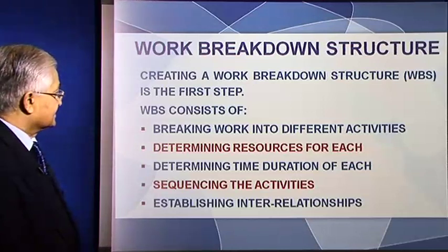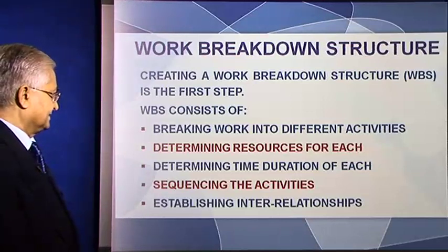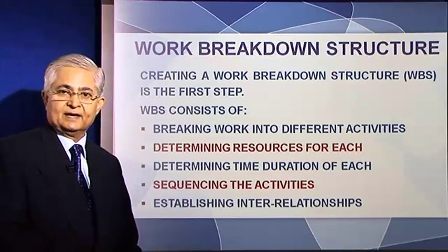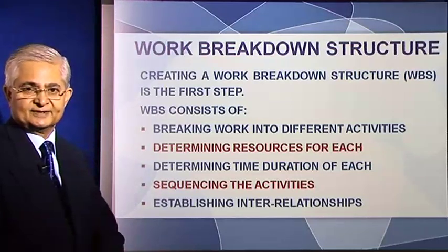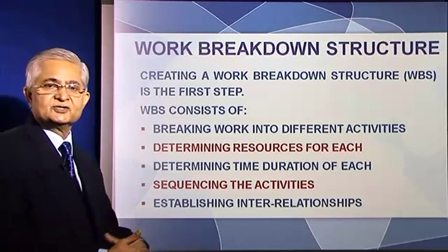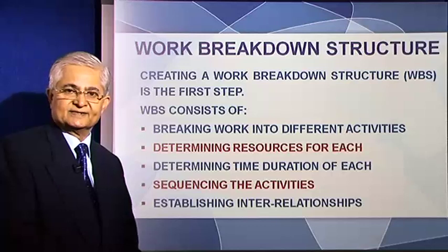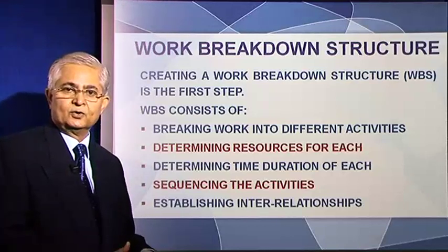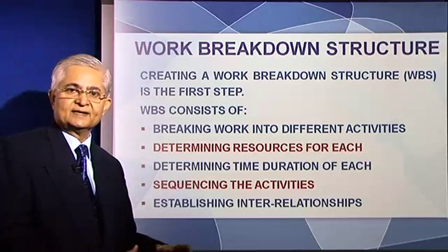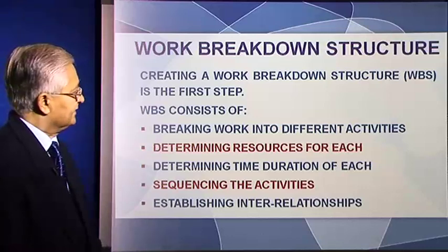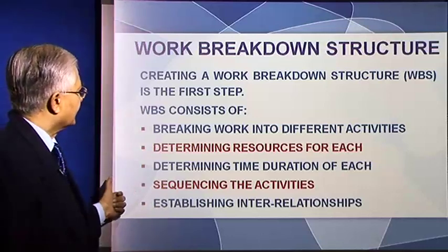Then there is the sequence of activities, meaning which activity comes first and which comes thereafter. And finally, there is the question of interrelationship between activities. Certain kinds of activities can start only after certain other activities are over, right? So, this is called the work breakdown structure.